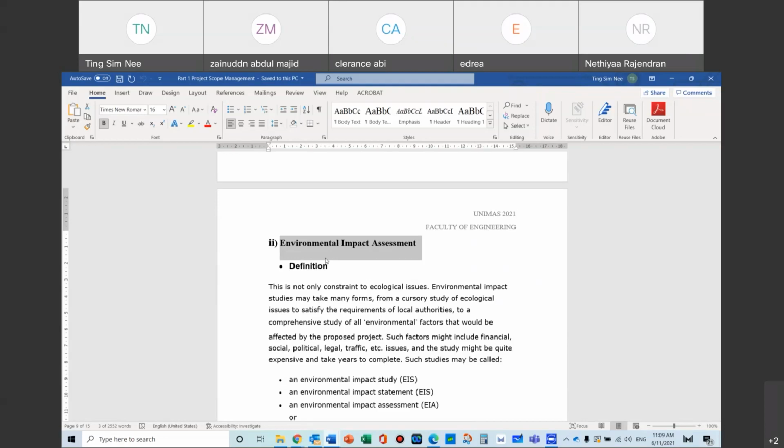I would actually need to study where my project will be affecting the pollution, the flora, the fauna, the waterway, the riverway, etc., the groundwater and all that. So then I hand in that report to the NREB, and NREB either approves or disapproves, and then after that they will ask you to do three-monthly or half-yearly kind of monitoring.